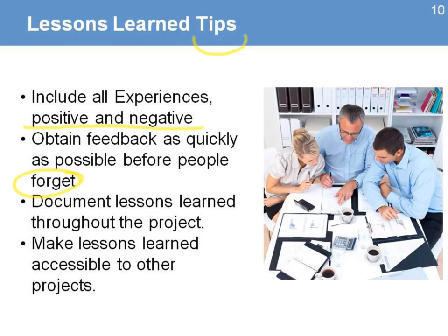Obtain feedback as quickly as possible before people forget. Don't wait too long to get this lessons learned session. Try to get it during the early stages of your closing phase, while your team's still on board. They have some time and they will be able to remember what happened in the project. Don't wait too long, because they might forget, and it's going to be harder for them to give the kind of quality you need in those lessons learned.